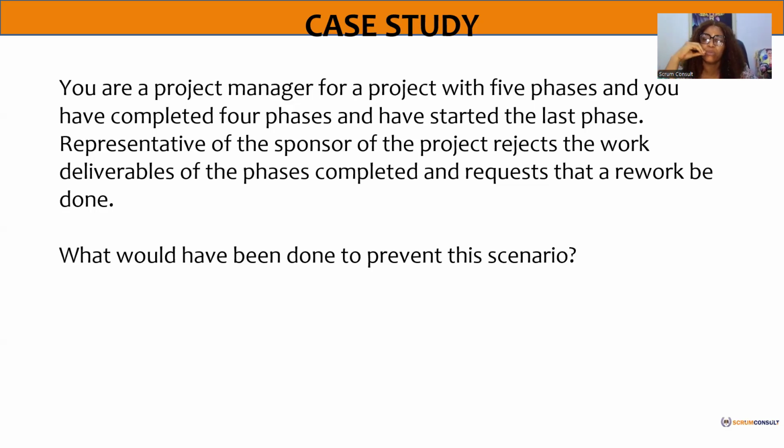You create what we call your schedule from your work breakdown structure. That schedule is about your project activities, the activities you need to create the work breakdown structure. We'll do schedule management. And based on each of those activities, you now start looking at the cost it will take to create each of those activities. So you aggregate those costs. You sum those costs up. That's a way of determining your budget.